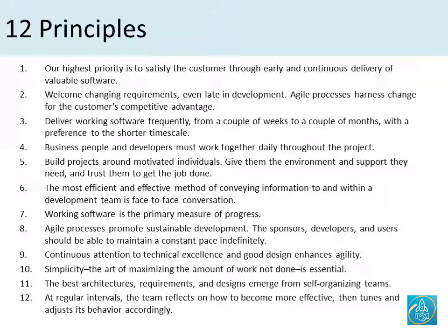And finally, you should be able to improve your processes. So as an example, in Scrum, at the end of every sprint, you have a sprint review. You see how you did, what kind of work you released. You demo it to the stakeholders. But then more importantly, you also have a sprint retrospective. So you're able to reflect upon how the overall processes are going and whether there is any scope for improvement.